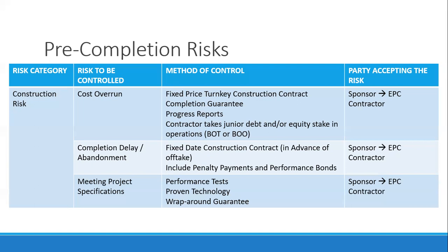For meeting project specifications, you require performance tests or commissioning — there should be no acceptance and no payment without commissioning. You also use proven technology, and there should be a wraparound guarantee that all components of the project together will deliver the required project specifications. This is set through the EPC contract.